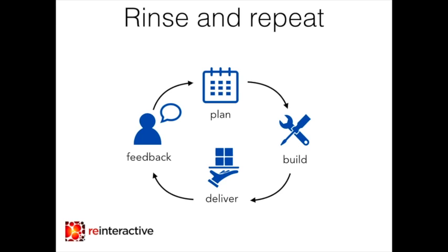And basically, once we've finished an iteration, we start planning for the next one. We actually plan before we reach the end of the iteration. We start planning for the next one, and basically we just keep on doing those iterations until we've decided that we have provided enough functionality to the users. And each iteration, we're going to learn a lot from our users, and so that's going to really influence the plan for the next iteration. And that's really key, that we want to be dynamic in our iteration plan.